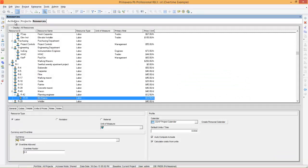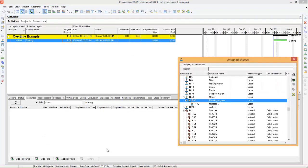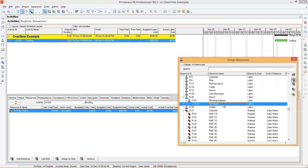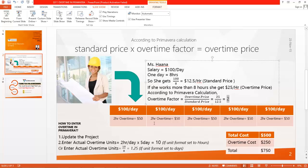After that you can go to activities and assign the resource to the activity. Add resource, assign Miss Hanna, then close it. Miss Hanna is working 8 hours per day, that makes 40 units, and the total cost becomes $500.